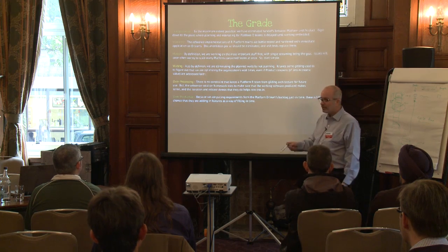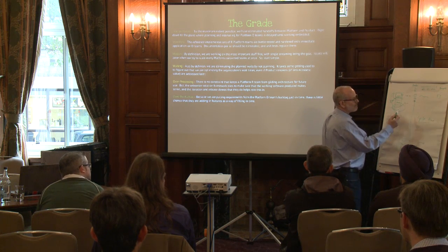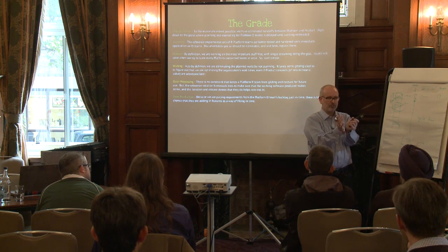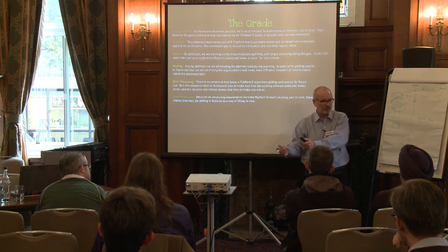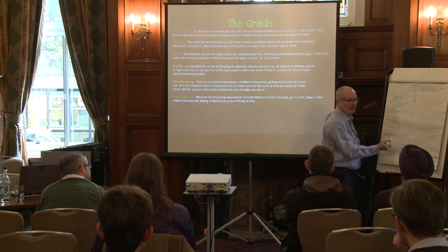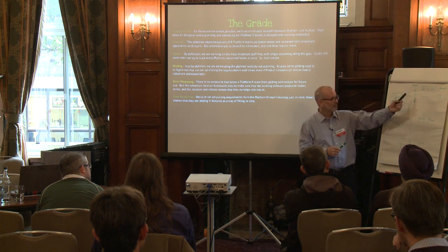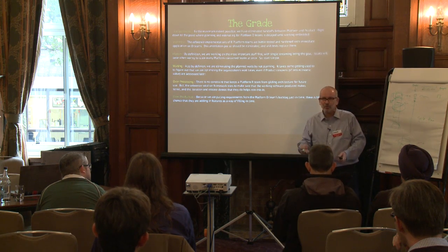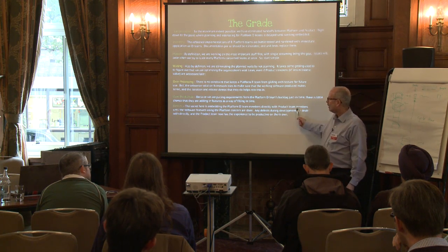In terms of overproduction, the reason it really gets nailed is that even though Scrum tries to abhor the planning process, planning is mostly a push type of process. We put all these things out there, do our plan, and then we work upon the plan. The Kanban that we're talking about using is purely pull, right? It's just-in-time delivery of the requirements, if you will, for the platform team to handle. So, in terms of overproduction, there is none because we're not producing until we see the need. So that kind of nails that.